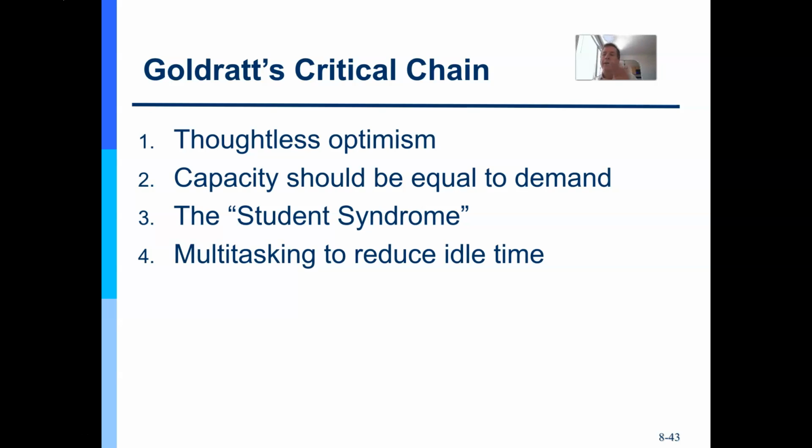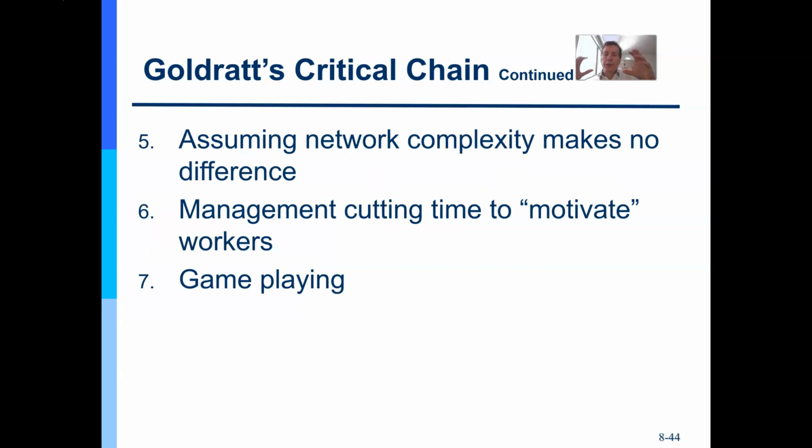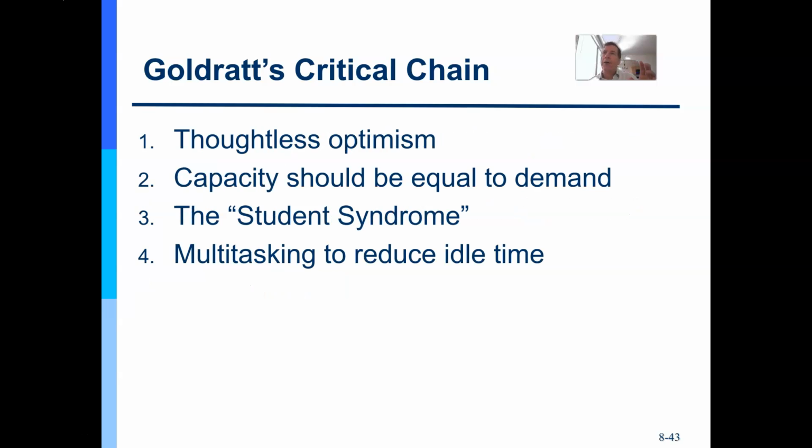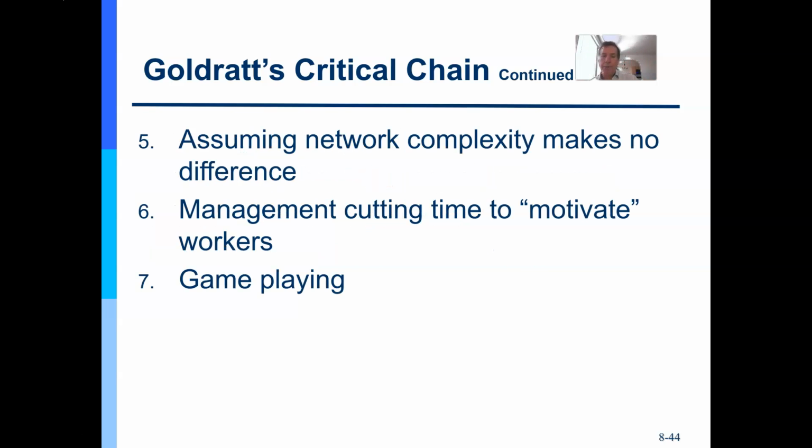Okay, nothing personal, but students tend to stay up and pull an all-nighter the night before to finish an assignment on time, right? And multitasking can also help reduce idle time. So because of that, what Goldratt did was he took the network approach and he said, okay, I'm going to cut your activity times in half. And by cutting your activity times in half, I'm going to give you half the time you thought you had,